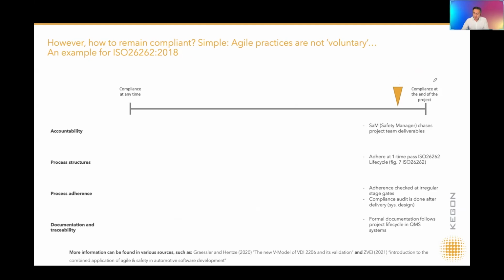And what typically happens is that there is a lot of compliance documentation tracked throughout the project, but somewhere at the end of the design phase, so at the time of homologation, at the time of mass industrialization, that's typically the moment when all of the compliance-related deliverables need to be finalized and put together. So it becomes extremely stressful at that moment, and also extremely risky if we find out all the way at the end that there's something that we missed.